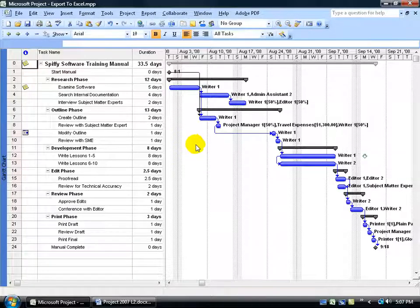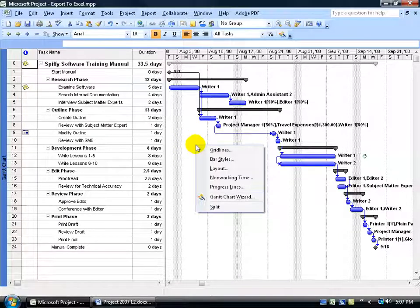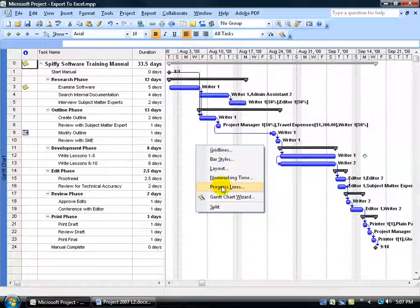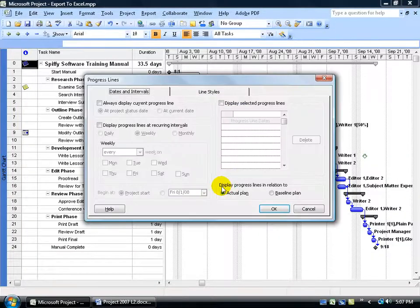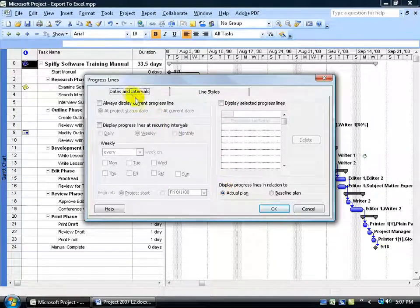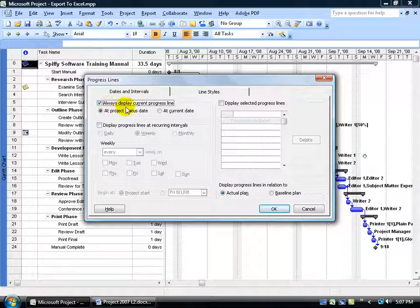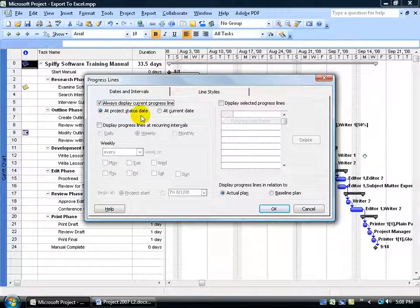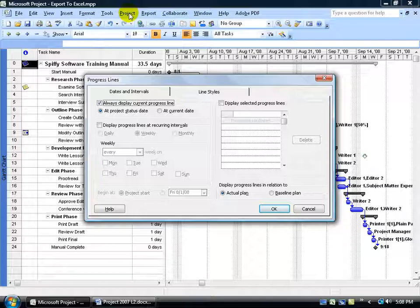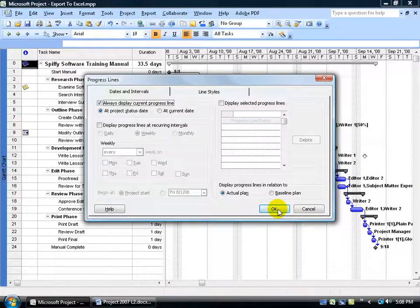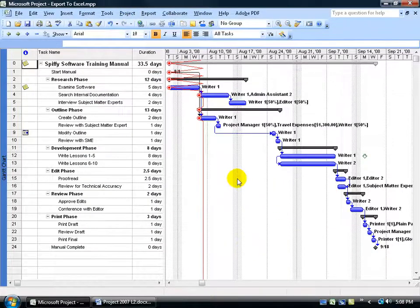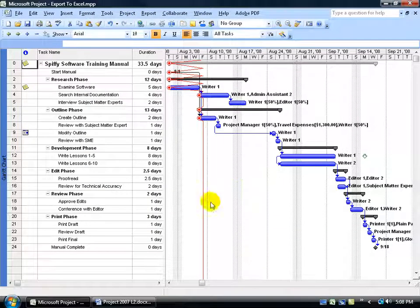Let's go ahead and move forward by right clicking in a blank area anywhere in the Gantt chart. Go down to progress lines and then up here on the dates and intervals tab, go ahead and check always display current progress line. And we're going to display it by default at the project status date. Remember, we set that status date up here in the project information screen. Click OK, draws the red line.